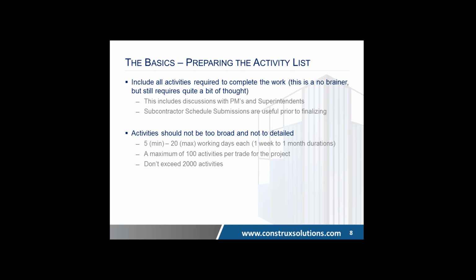Once things start getting a little bit more complicated, you'll start to see crews spreading and confusion, and that just results in trade stacking too. That just results in inefficiencies. I've studied inefficiencies, and I know for a fact that that happens. A lot of times it's due to just a misunderstanding around the schedule. So the more simple you make these things, the better off for everybody involved. Again, sometimes you can't. Sometimes you need more activities. At that point, it's a process of making sure that people are all on the same page on a constant basis.